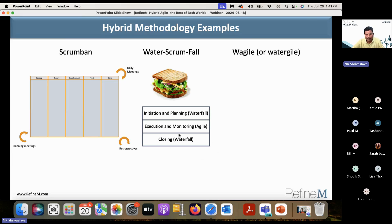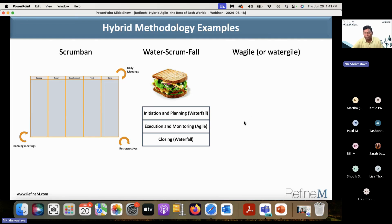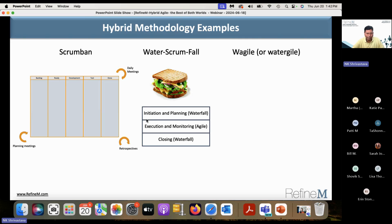The second example I call Water-Scrum-Fall — like a sandwich. You do initiation and planning upfront, like waterfall projects: project charter, WBS, schedule, resource plan, risk management plan. Then during execution and monitoring you use an iterative two or three week cycle. Then everything goes to production together. It's an agile layer in between waterfall layers — a sandwich approach used by many organizations.